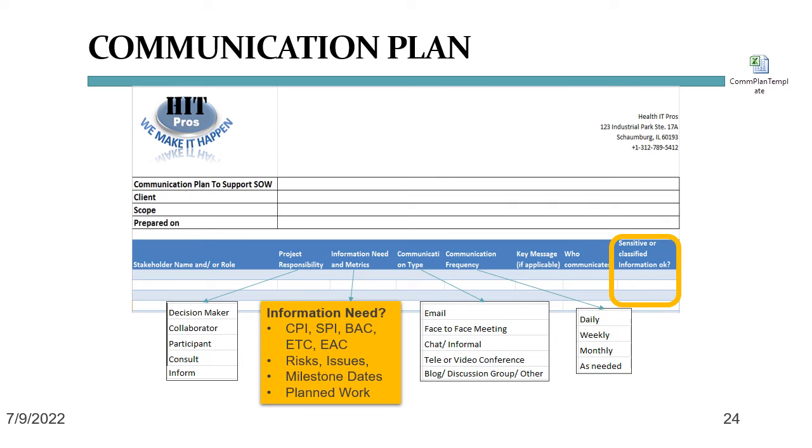Different information is for different levels of the organization, right? Imagine what would happen if confidential design information for a new product leaked outside your company just because you included the wrong person in an email list. Or if the agreed hourly rates for various contractors, which are important for the finance department to know, would accidentally also be sent to the contractors themselves, and they could see how much more or less someone from a different agency makes. That's why this yes-no switch or even more detailed information is important to document.